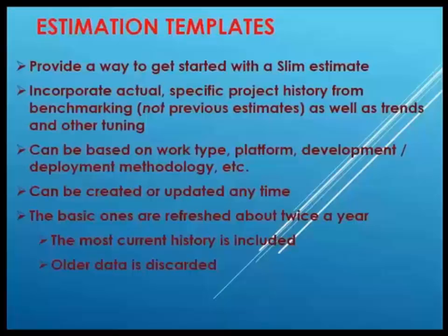We apply the most current history, of course, which is what you'd want. We throw out the old data when we create new, or when we update the templates, and this is critical. This is important for our organization, that we use only the most recent data, the last couple of years. But for other organizations, it may be better to have all the history applied, or more of it. So it's a preference.